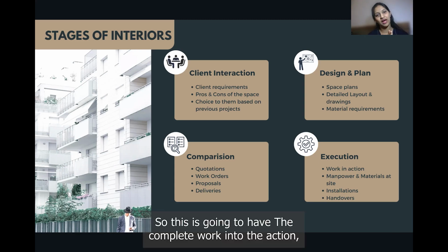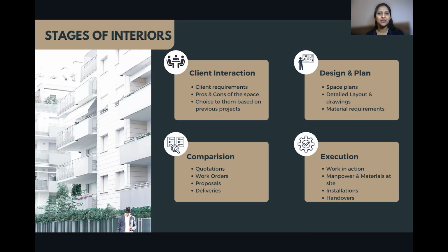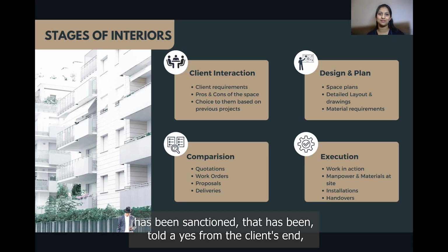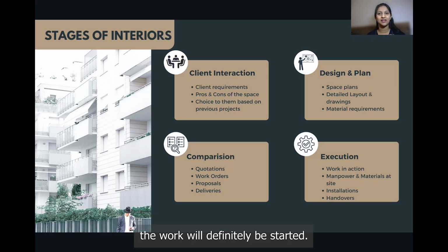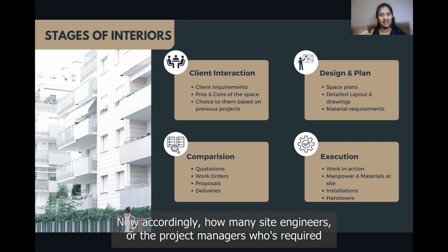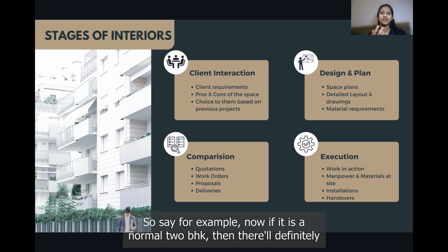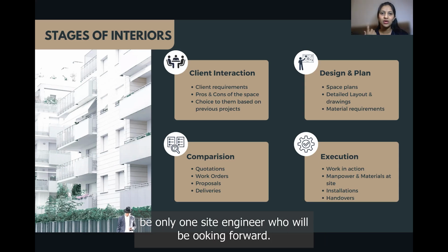Then moving forward, there is the final stage, the interiors. This is going to have the complete work into action. Over here, all of this work that has been planned, that has been sanctioned, that has been told yes from the client's end, will definitely be started. Accordingly, there is the question of how many site engineers or project managers are required to look after that particular site. So say for example, if it is a normal 2 BHK, then there will definitely be only one site engineer looking after it.